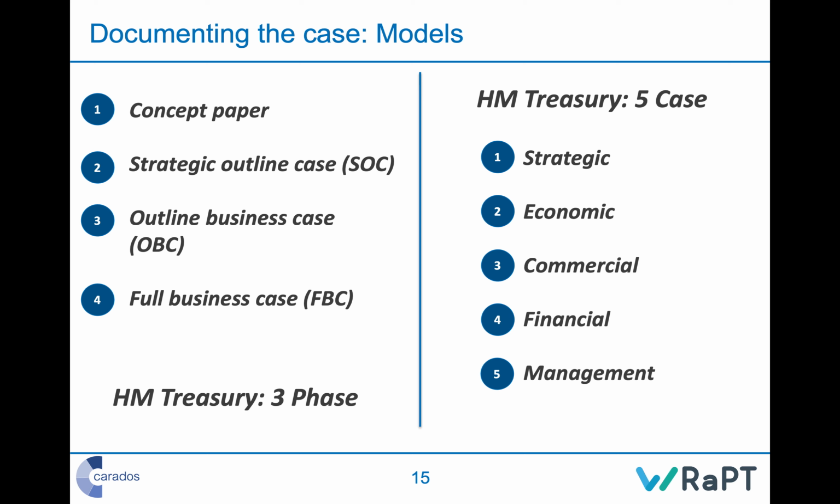There's quite often a process you have to go through for investment. Certainly in trusts there might be a business or a commercial process you have to go through. Sending them a commercial paper early on that says, look, this is the high level view of the change, the issues, and the expected benefits is a good start. Helps build up engagement. Then you can move to the strategic outline cases where you set out the strategic fit with what they're trying to do, but again it's fairly high level.